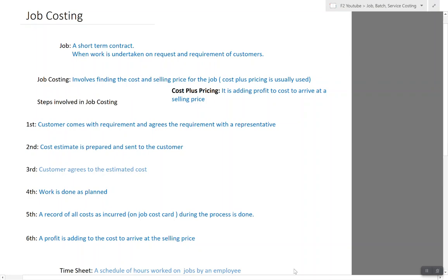We call it cost estimate because if you want to know what is the difference between quotation and estimate, this is where you know the main difference. Estimate is prepared when something is not 100% confirmed. So obviously the price that the carpenter says could increase or decrease, depending on the actual cost or depending on maybe any changes made in the middle by the customer.